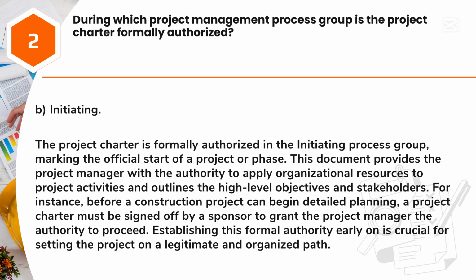For instance, before a construction project can begin detailed planning, a project charter must be signed off by a sponsor to grant the project manager the authority to proceed. Establishing this formal authority early on is crucial for setting the project on a legitimate and organized path.